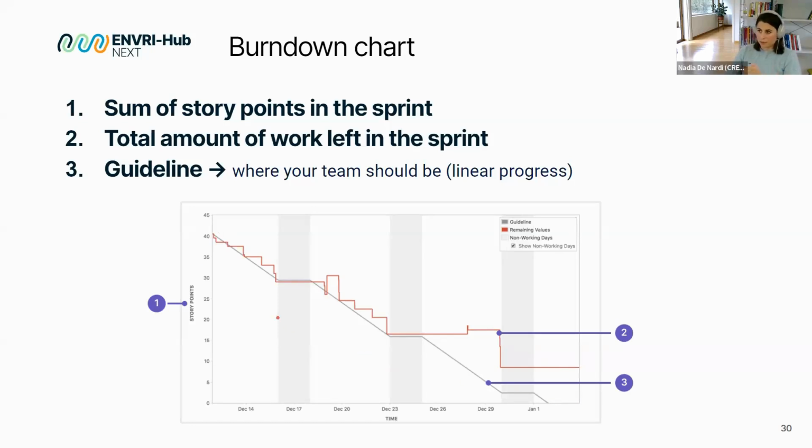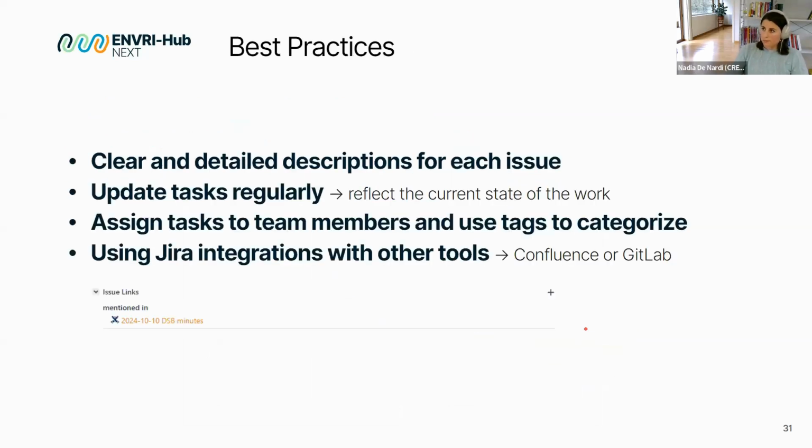So every user story must be set to done, okay? And here it seems that after 1 day I close one user story, then I close another. It should go like this, but normally it's 40 till the end, and the day before it goes to 0, or maybe not even to 0. If I wasn't able to close my user story, it remains open and I need to move it to the next sprint. And this is called a burn down chart.